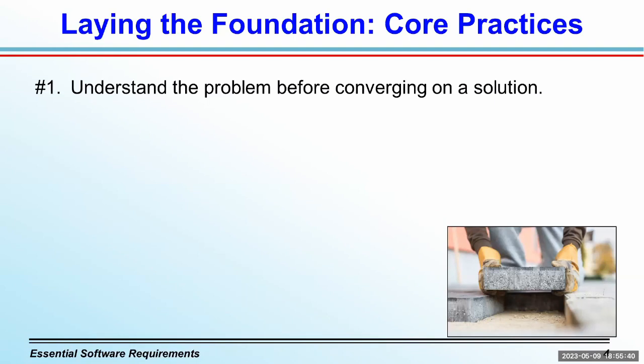Organizations launch initiatives to solve a business problem or maybe exploit an opportunity. However, sometimes those problems or opportunities are not explicitly stated or documented. So it's important to understand the problem before converging on a solution. I suggest that you don't presume that either a presented problem or a proposed solution is necessarily correct. Instead, it's a good idea to do some root cause analysis to make sure the problem is well understood and that a proposed solution does make sense.